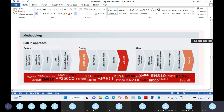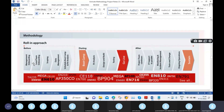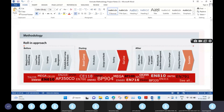Finally, before the project officially starts, we conduct a boot camp. In that boot camp we explain everything to the management and local team. The project then starts from the Fit Analysis phase. The boot camp generally includes kickoff meetings — in real time, kickoff meetings are conducted as part of the boot camp. A kickoff meeting is how we formally start any project.